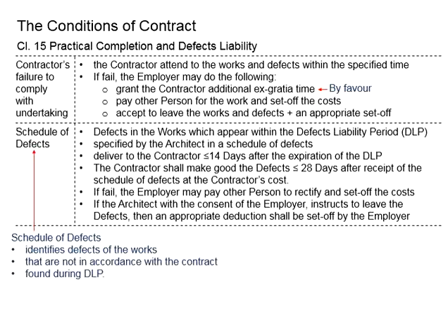That means once the project is handed over to the employer, the defect liability period will start. It is normally in the range of 12 months. Within these 12 months, there shouldn't be any defects in the work.